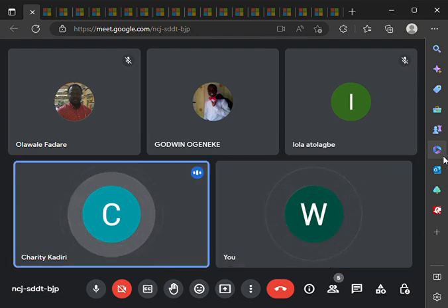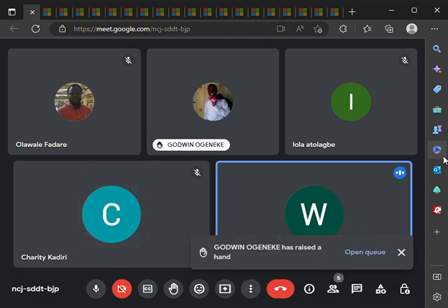So if you look at costing, there are three things we are focusing on. Estimate it. You look at basically the thing you want to cost, you have to estimate. We are saying that to estimate, go to the grassroots, to the bottom of the activities in that project and start estimation from there. The reason why you are using bottom up estimation from the grassroots is because it makes your estimation more accurate. Yes, Godwin, any question? Go on.